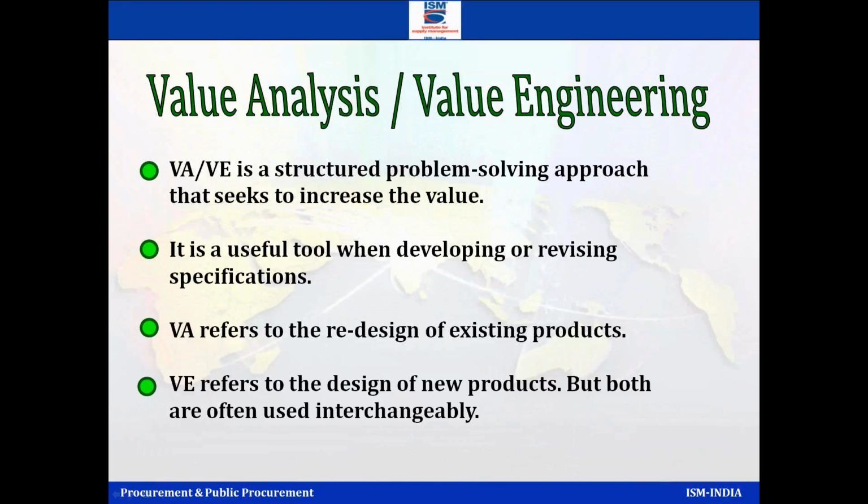Value engineering is when I'm on the drawing board. I'm designing the product, but I consult somebody from a supplier or from procurement, asking whether this is what I should release as a drawing. The supplier comes and tells us that if you make these changes, your cost will go down, your operation cost will go down. That's what we call value engineering. You're adding value at the engineering stage. Value analysis adds value only after the product has been launched. So there's VA and VE: one at the drawing board stage, one after it has come to the market.